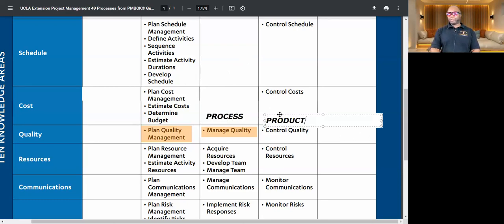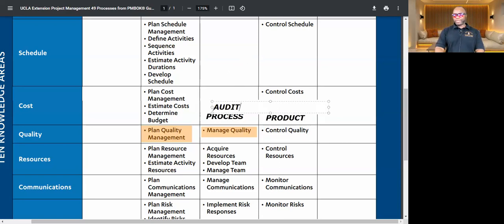Doing a final walkthrough is too late by then, because what if you got it wrong as you were building? That's why we want audits. So managed quality is where you have these audits. You're auditing the process. You're seeing that someone wasn't harnessed as he was climbing up this scaffold or something. He had no harness, and then the possibility of falling to his death. Then you have to make the correction. If you do an audit and find that someone's violating the process, then you have to make the correction.